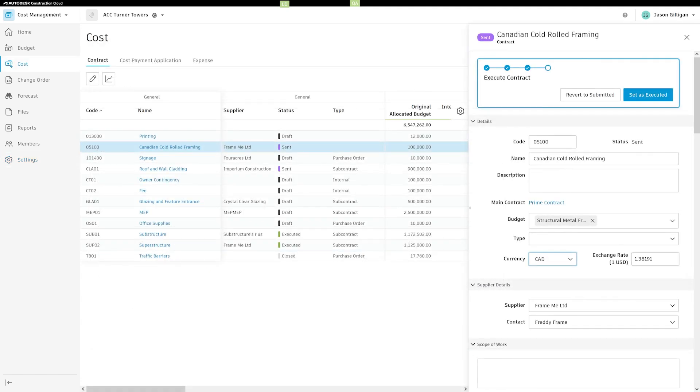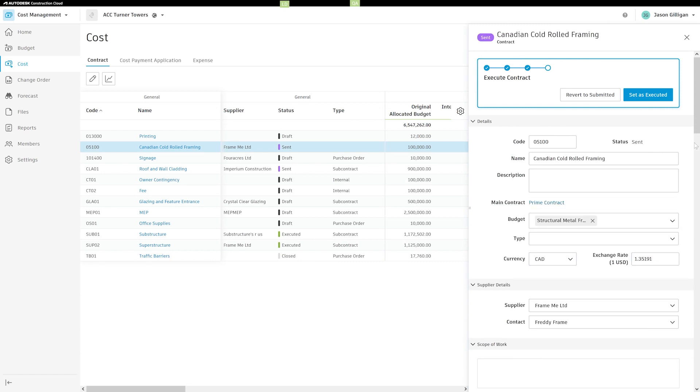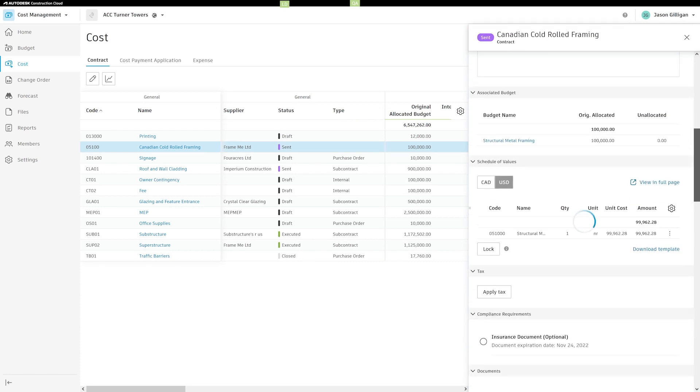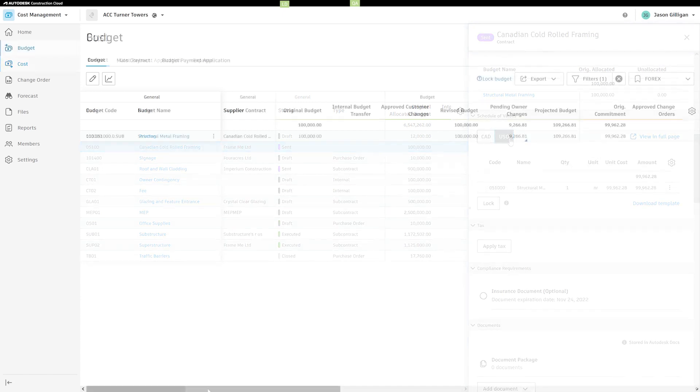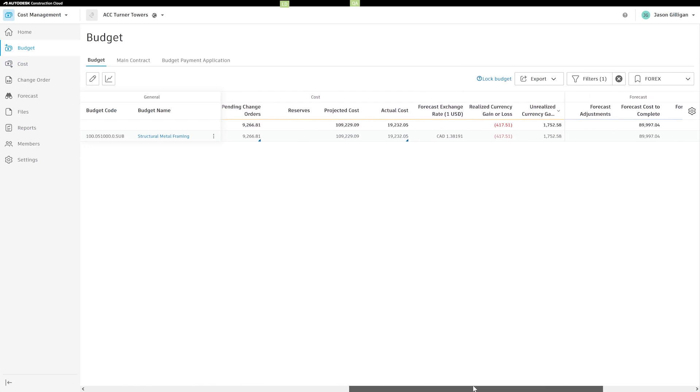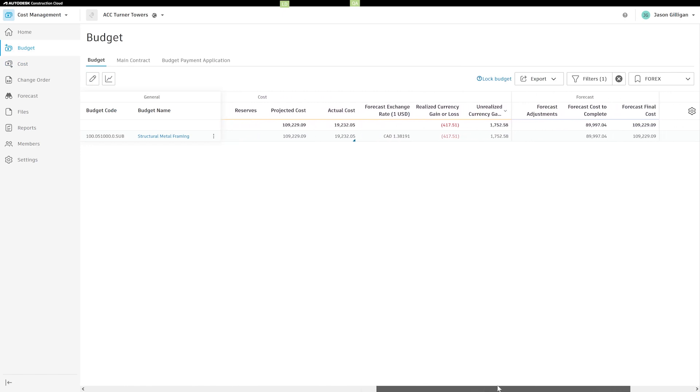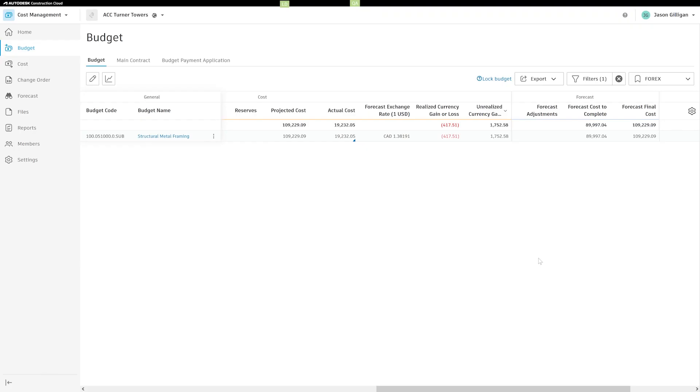Now, in cost management in Autodesk Build, teams can easily manage supplier contracts, change orders, payment applications, and expenses in different currencies. The system automatically converts the foreign currency back to the project's base currency, helping users better understand the amounts being spent and how currency fluctuations could affect their bottom line.